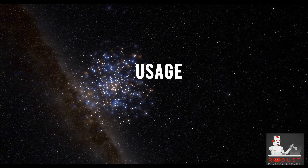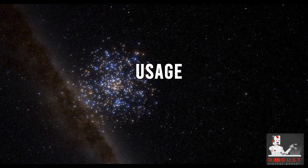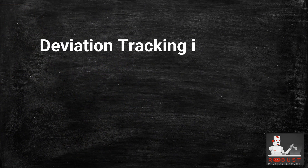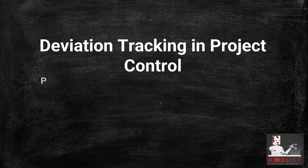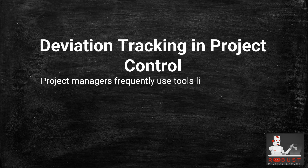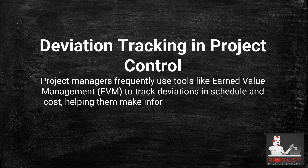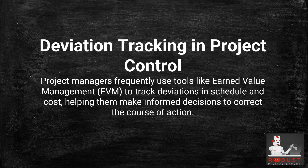Usage — Deviation Tracking in Project Control: Project managers frequently use tools like Earned Value Management (EVM) to track deviations in schedule and cost, helping them make informed decisions to correct the course of action.